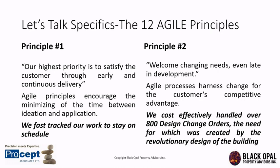But because we allocated sufficient contingency, a financial one, these weekly events were instrumental in our ability to avoid confusion. Our weekly meetings were signified by our calm analysis of the items in question. Quick remedies were devised and exhaustively analyzed by our quantity surveyors to contain the cost. And we then implemented them after we came to agreement with the various delivery elements, such as our subcontractors. As a result, we controlled our claims process with a disciplined approach, including thorough documentation. At the end of the project, we saved $180 million in claims by our rigorous control of the design change orders.